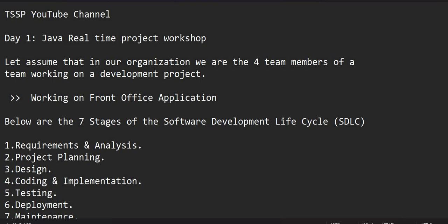Okay, so 4 members into 8 hours, or 7.5 on average, we can say 32 story points. 32 story points, 32 into 1 story point is 8 hours. On that basis, we can get 256 hours. 256 hours of work will be taken for the 4 members of the team.